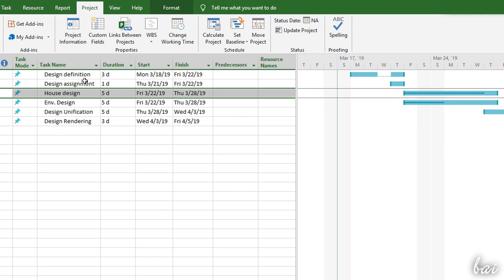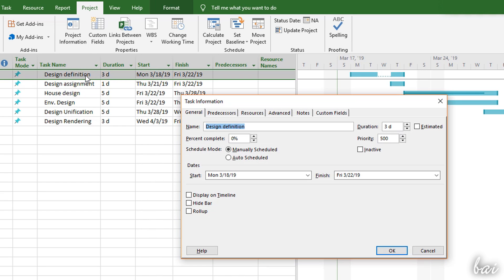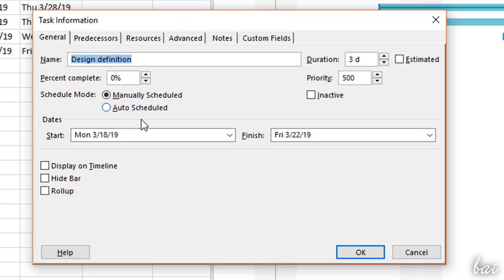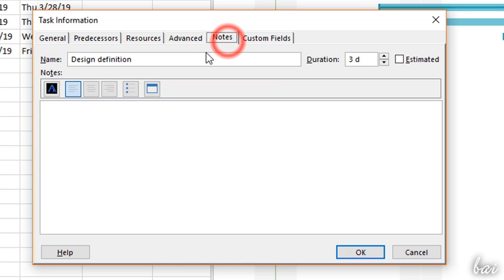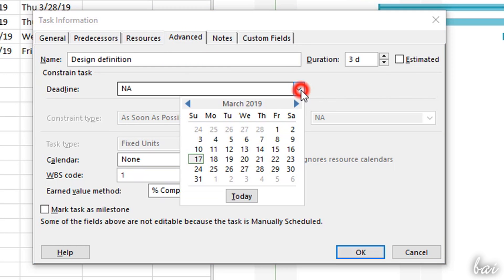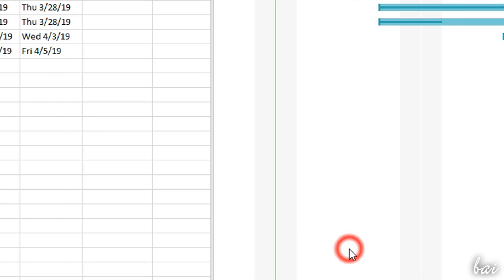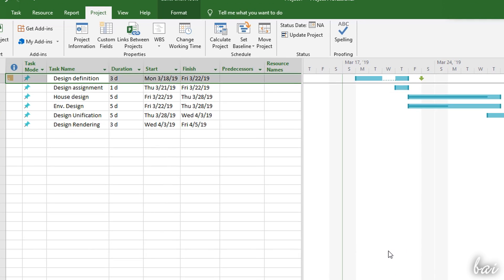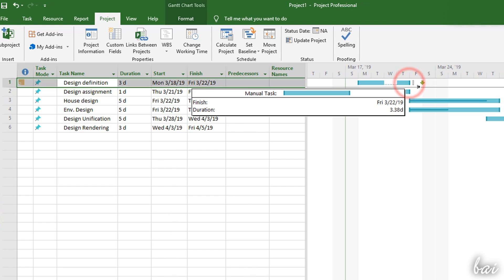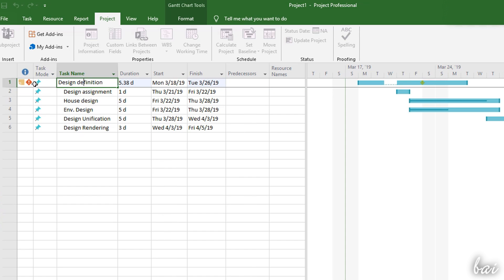If you need to adjust all the details regarding any task, just double-click on its name and open the Task Information panel. Here you can adjust percentage, priority, duration and also start and finish dates. Under Notes, you can write additional comments and details. Under Advanced, you can fix a final deadline for the task to be respected. This is indicated as a green down arrow on the Gantt chart, and in case the task overcomes it, Project gives you a warning on the Task Sheet.